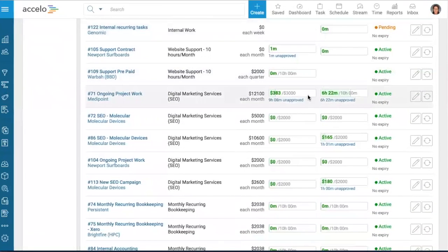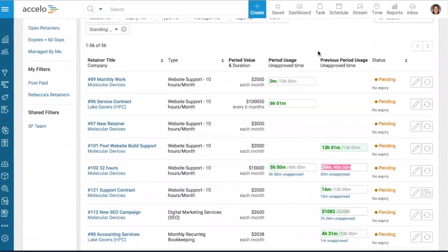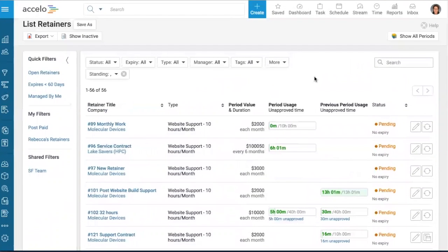It's 10 days into the month and they've already used 90% of the retainer. The burn looks really high. Let's alert them and let them know that they're using a lot of their retainer. So you're able to see this from here. They're able to see it from their client portal on the budget and the usage as well. But those automated alerts have been really helpful for our customers so that there's a lot of transparency and communication about that retainer.